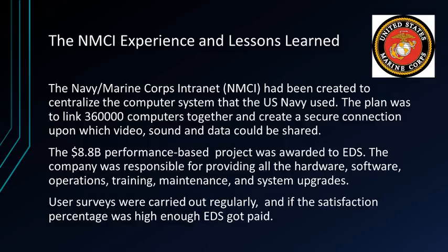The $8.8 billion performance-based project was awarded to EDS. The company was responsible for providing all the hardware, software, operations, training, maintenance and system upgrades. User surveys were carried out regularly, and if the satisfaction percentage was high enough, EDS got paid. Meaning, if the Navy and Marine employees did not like the system that EDS implemented, they would not have got paid.